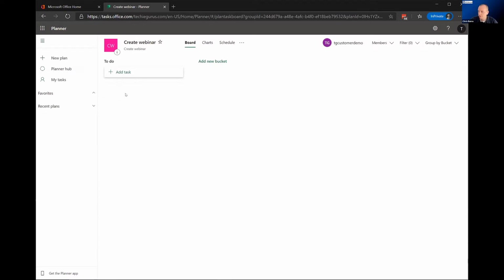So let's think about what's a simple task for creating a webinar. Okay, let's choose a subject. We need to choose a subject for the webinar, right? Now we want to set a due date. Let's say we're going to give ourselves 2 days to do this. And I'm going to assign it to myself, and maybe my demo account, and maybe I'll assign it to somebody else. Let's assign it to me as well.